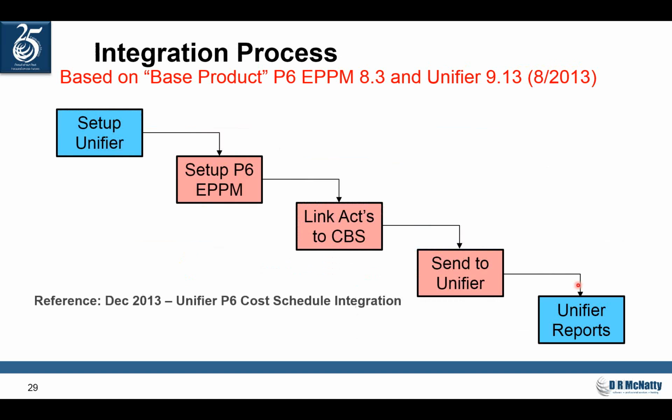Here's how the integration process works with P6. You first prepare for integration in Unifier, set it up in P6 EPPM, although with the recent release of 8.3.2 as a service pack, you can now do your setup with P6 Pro as well. You link your P6 activities to the cost breakdown structure, send it to Unifier, and then do your reports or your cash flow diagram, whatever you would like to do.